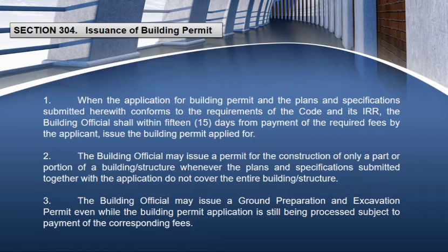So according to number 1, after 15 days pa makukuha ang building permit. Still, the building official may allow the applicant to do construction activities like ground preparation and excavation even though wala pa talagang building permit. So yun lang po ang ina-allow ng building official.